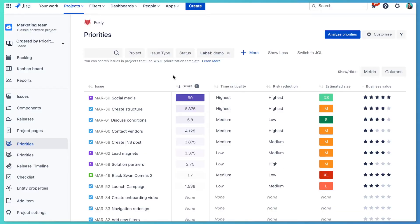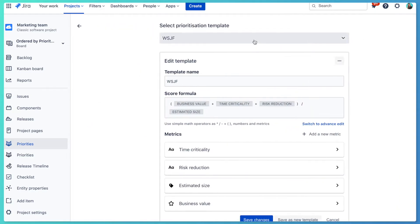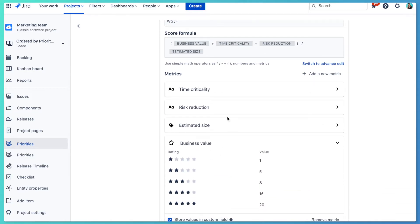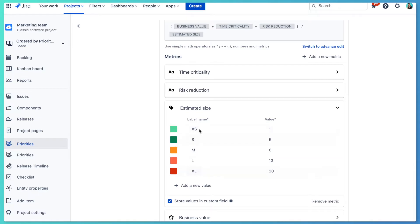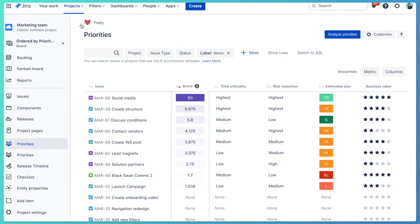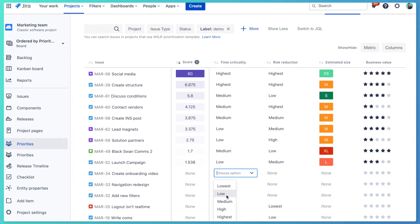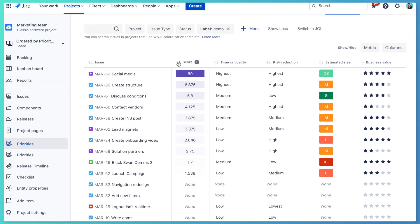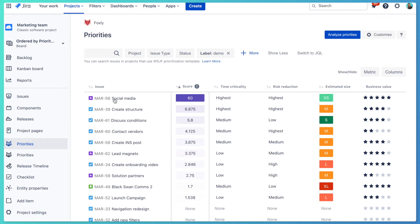Now let's have a closer look at an example of how you can use this method. I have a sample backlog of tasks to prioritize in Jira, and I'm using Foxly, a backlog prioritization app for Jira, to record our metrics. The Weighted Shortest Job First method is predefined in the app, and here you can see its metrics: business value, time criticality, risk reduction, and estimated size. Here is a priority table where I can fill each of these metrics for all issues. Once we fill them all up, we can look at the final priority score and order our list from highest to lowest to see the most important tasks at the top.